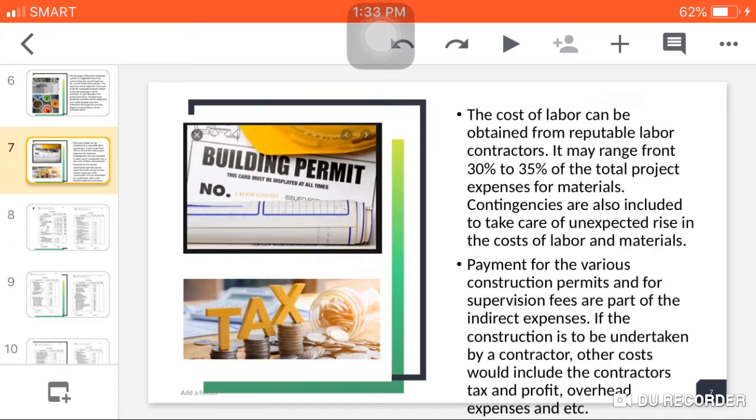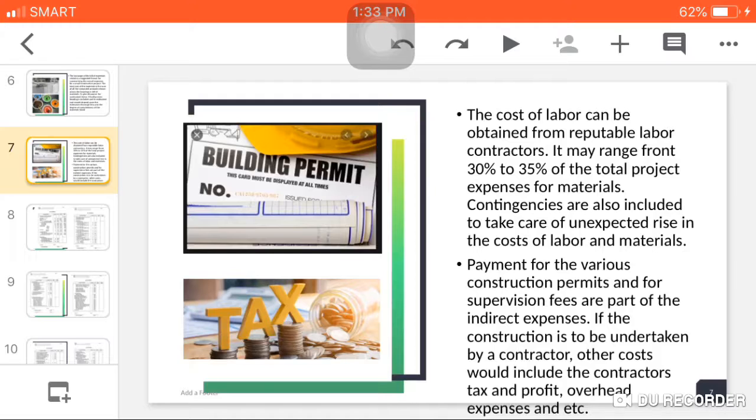The cost of labor can be obtained from reputable labor contractors. It may range from 30% to 35% of the total project, depending on the contractors. Contingencies are also included to take care of unexpected rise in the costs of labor and materials.